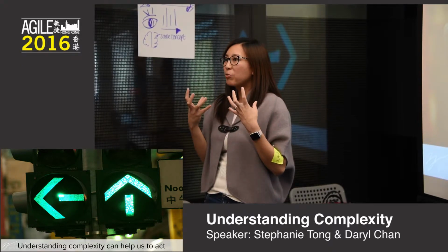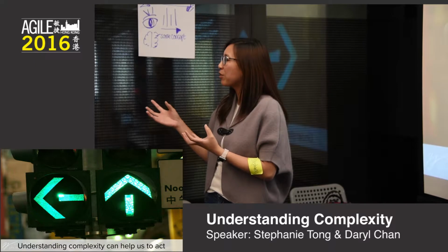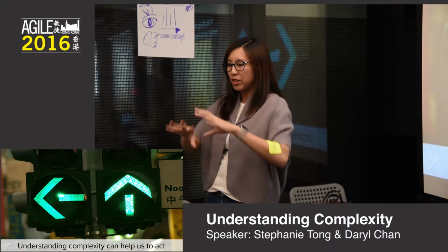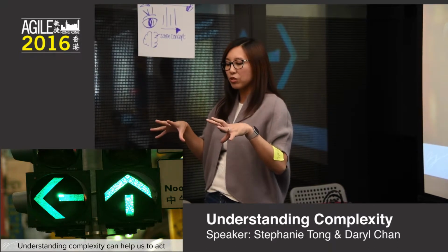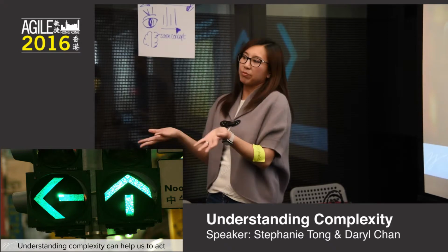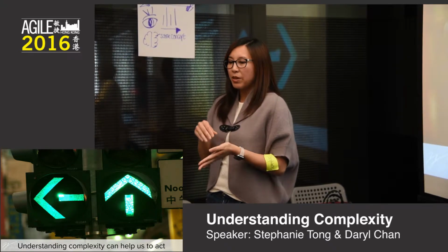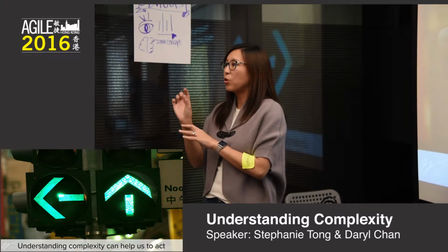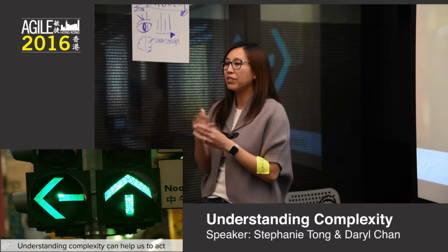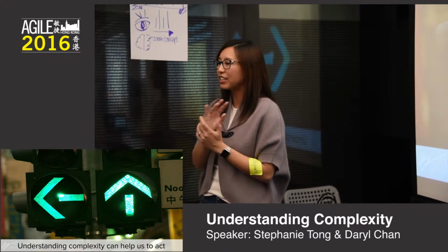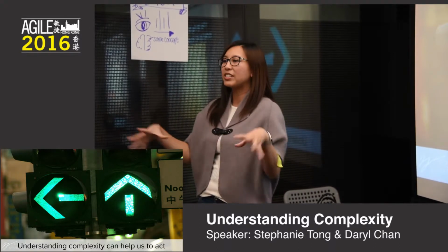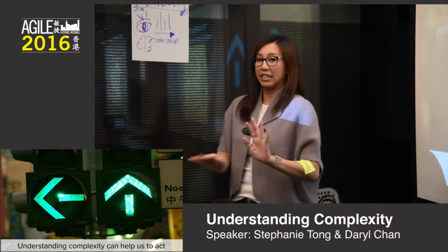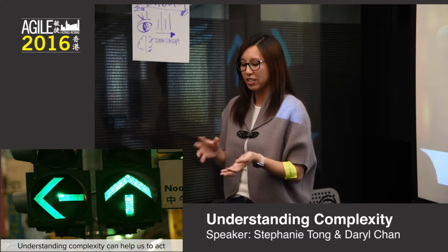So how do we know that's a problematic area, and how do we deal with that? We start off with inception phase, and at the boundary we kind of know what we want to do, and then we set up our MVP as per our normal annual projects, but we have set up what we call the MVP hypothesis. So we have listed out 10 things that, if these 10 things go wrong, it will highly likely go wrong and will derail the whole project. So as a team, we highlighted those 10 things, and one of the things is integration, because we have no idea how the system looks like. I just know we need to integrate.